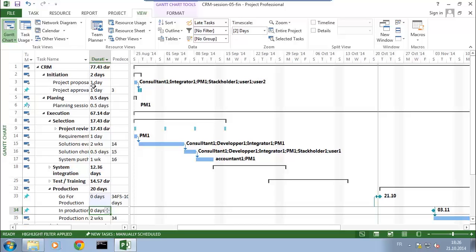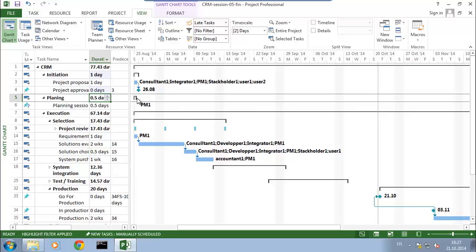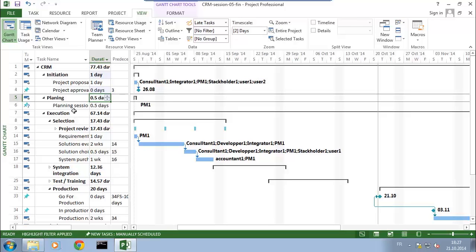So how do I do that? I select the task and I simply set a duration of zero days for that task. By setting it to zero days, it has changed its shape to a diamond shape, which is what we call a milestone. What I intend to show by showing the milestone is to say: here is an important date — it's when our project is going to be approved.